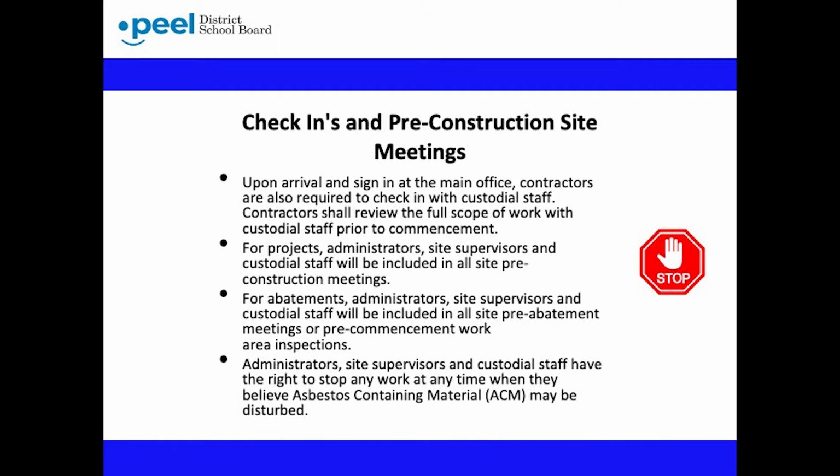For abatements, administrators, site supervisors, and custodial staff will be included in all site pre-abatement meetings or pre-commencement work area inspections. Administrators, site supervisors, and custodial staff have the right to stop any work at any time when they believe asbestos-containing material, ACM, may be disturbed.